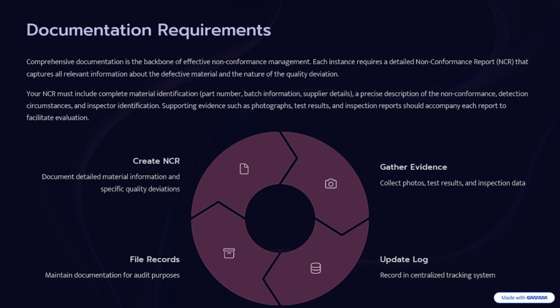Once you make the NCR report, the first thing that will come is the description, then the material information you will mention, then what is the problem in that material you will mention, and things like preventive action, corrective actions, and so on, that have to be taken through the supplier.